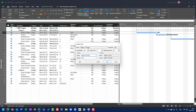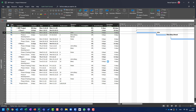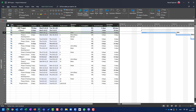What will happen: total duration will be ten days, actual duration will be two days, remaining duration will be eight days, percentage complete will be 20%, but the start date will be changed to 5th of October. When I click OK, you can see that I didn't only change the total duration — I also changed the start date by entering the real actual start date.